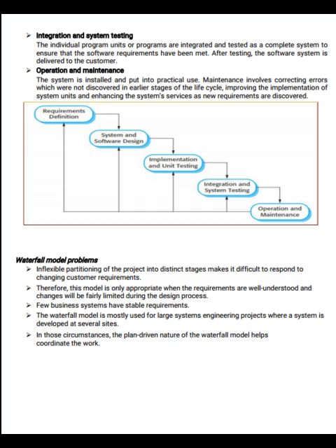Now let us see waterfall model problems. Inflexible partitioning of the project into distinct stages makes it difficult to respond to changing customer requirements. Therefore, this model is only appropriate when the requirements are well understood and changes will be fairly limited during the design process. Few business systems have stable requirements. The waterfall model is mostly used for large systems engineering projects where a system is developed at several sites. In those circumstances, the plan-driven nature of the waterfall model helps coordinate the work.